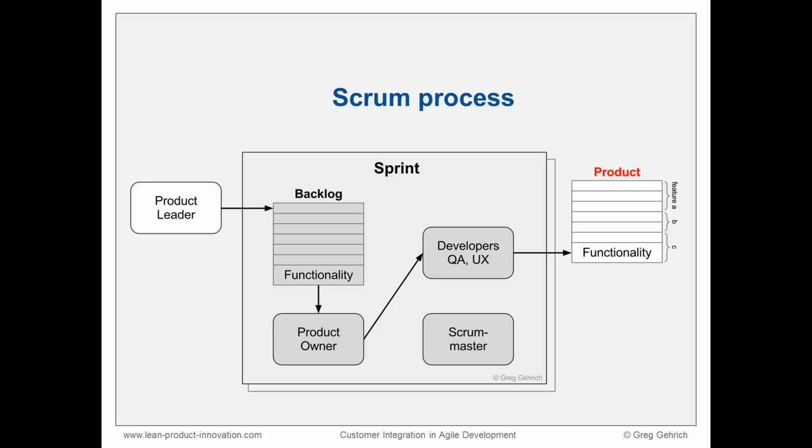When the business grows beyond a small startup, there are typically multiple teams running sprints concurrently for the same product. The purpose of these sprints may be to add features, work on infrastructure, patch or fix bugs, or refine the UX. To integrate multiple concurrent sprints, a separate sprint team ensures they come together coherently. These are sometimes called the Scrum of Scrums and are composed of individual Agile team leads.